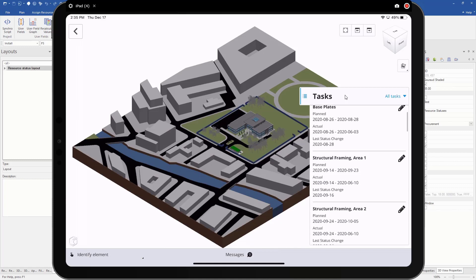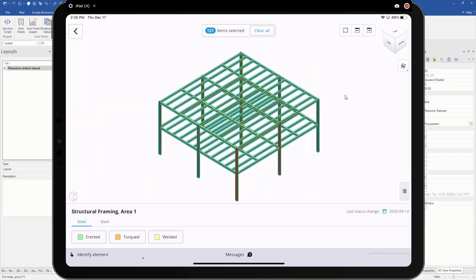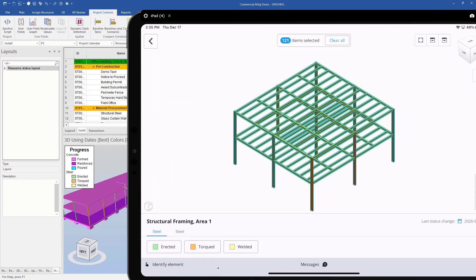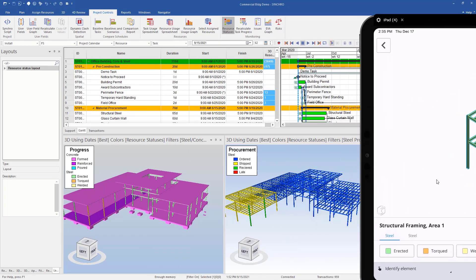So now if I go to that structural framing, you can see here we have our steel. It's all green, so we know erected, and then we have one that's torqued. So if I move this over, we can see here that looks very similar.